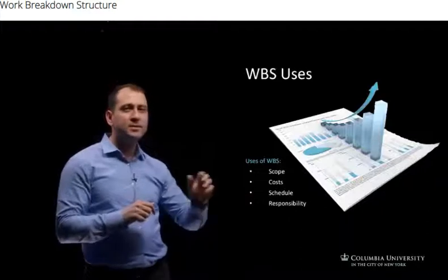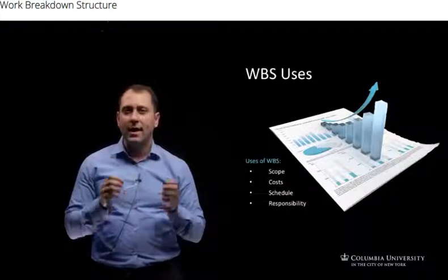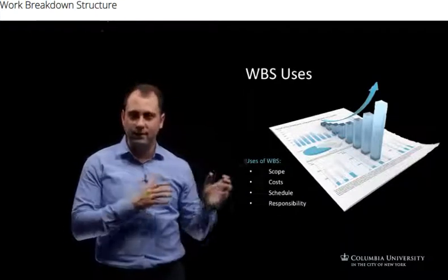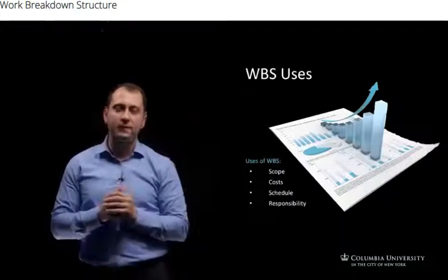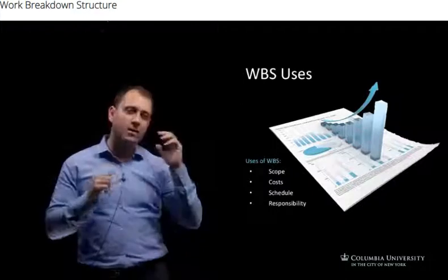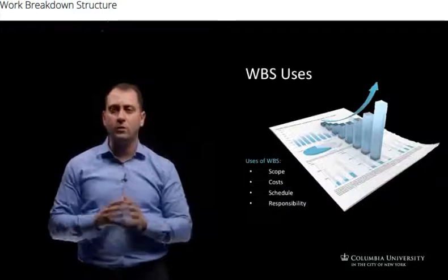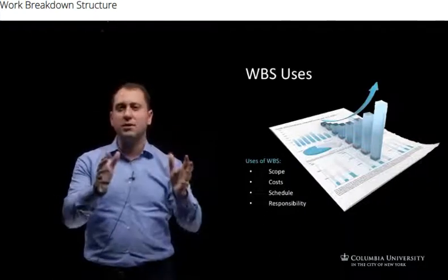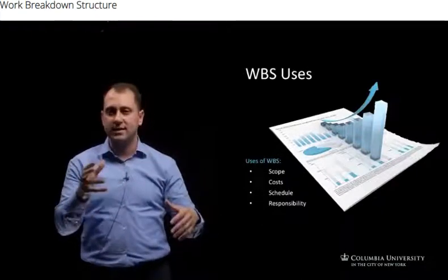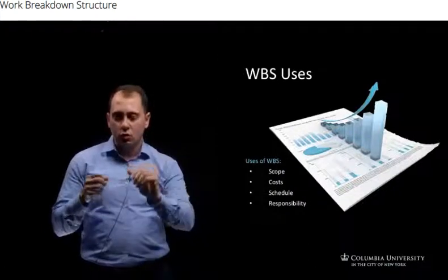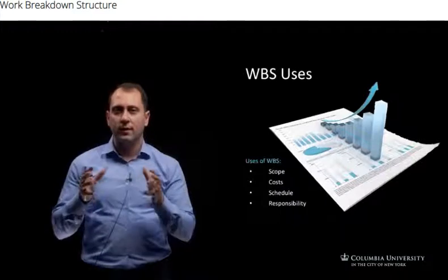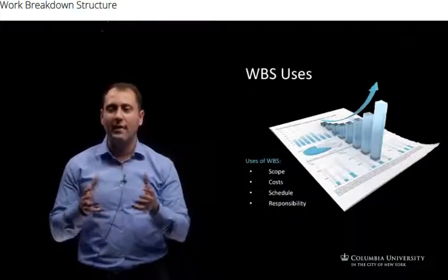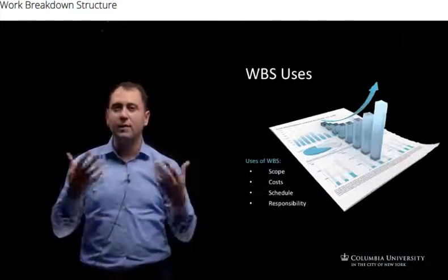Last but not least, it helps with responsibilities. A construction owner and a project manager can use a WBS to easily assign responsibilities for the work to be done. In this case, if you remember from the example before, the construction manager can say, okay, we have this individual or subcontractor working only on the foundation. That individual responsible for the foundation will then assign the other work packages, let's say excavation and footings. When you go into the footings to see who is responsible for building them, they will then be responsible for identifying the construction activities, or the activity list, in that specific work package to deliver it later.